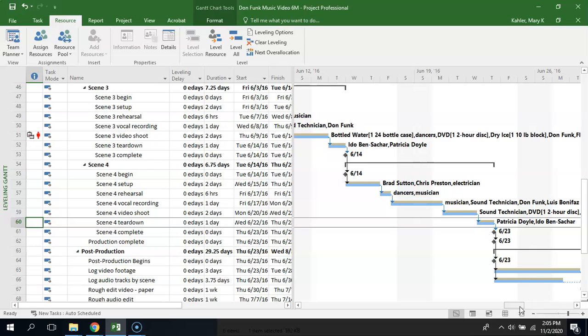The gray bar, well, they call it a tan bar in the book. It looks gray to me. It represents the pre-leveled task, and then the light blue bottom bar represents the leveled task. The effect that leveling had on the finish date was to extend it by about 3 days. And you can see all the values for any task by pointing to the desired tan bar.